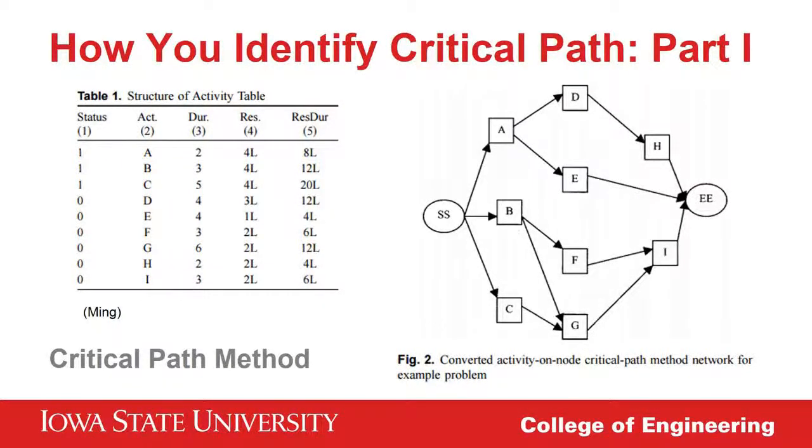The corresponding chart on the left lists the durations, resources, and then res-dur, what you might call man-hours. Often with this type of diagram, the user will write the activity length right on each arrow on the flow chart. For example, both arrows coming out of the node A box would have the number 2 attached. The user then adds up the numbers of each arrow along the different paths, and the longest one wins, or becomes known as a critical path.